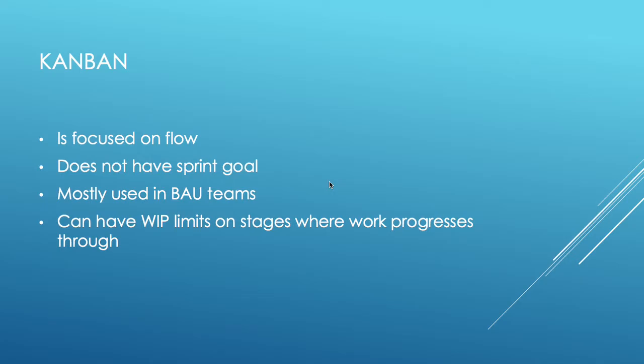So you may find in your organizations that sometimes you are able to fill up the entire sprint backlog and work on it for the next 2 weeks or 4 weeks. And then there are some times when you have finished a project and you are unable to fill up the sprint backlog and you're mostly pulling in BAU work. So you have transitioned to Kanban at this point.